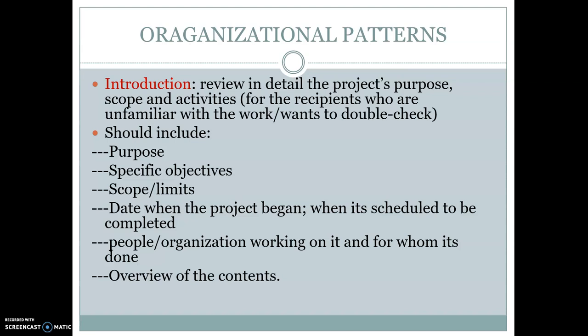The introduction can contain the following. The first one is purpose of the project. The second, specific objectives of the project. Third, scope or limits of the project. Fourth, date the project began, date the project is scheduled to complete.